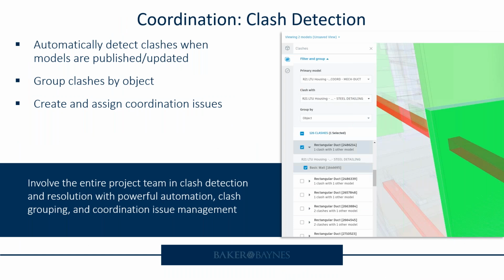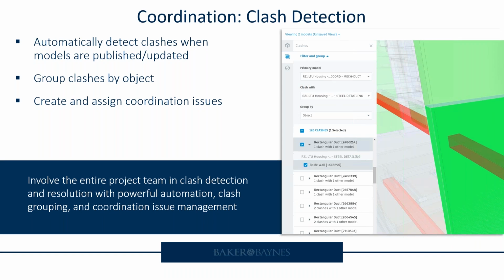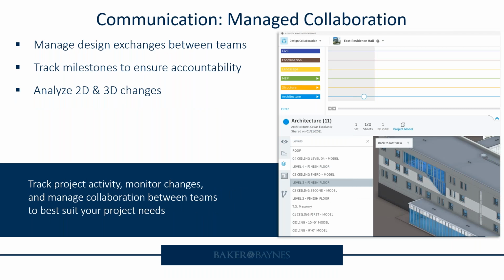Like I mentioned, if you are used to BIM 360 Design or BIM 360 Coordinate, all of those tools that you used to love and use on a frequent basis are still available. Clash detection is still there. You can identify your different clashes, keep them updated as new models are uploaded weekly, and involve everyone in that. So in coordination meetings, you know which issues to address, and perhaps who hasn't responded to their issues, everything in one place.